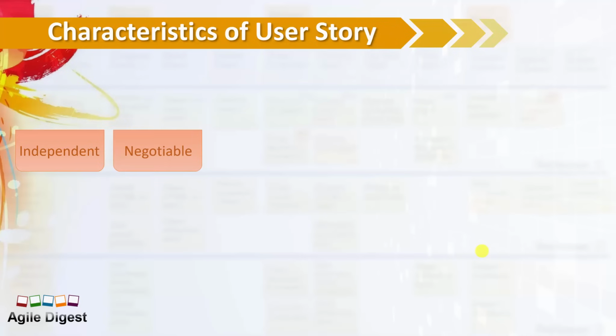It has to be negotiable. When we create the user story for the first time, it's not necessary that the user story will have all the information, or that whatever information is written is confirmed and we cannot change it. So the product owner keeps on adding the ideas or upcoming functionalities that he thinks of and keeps on prioritizing them. And we go through a grooming session where we pick up the stories and priorities that are already there. We need to work on our future sprint to find out whether those stories are ready or not ready to start working on.